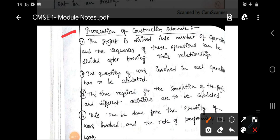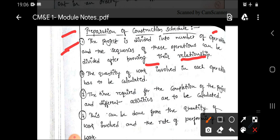Next comes the preparation of a construction schedule — what are the steps involved in the preparation of a construction schedule in order to get the duration of a particular project. The first step is: the project is divided into a number of operations or activities, and the sequence of these operations is determined after knowing their relationship. If you want to calculate the schedule of a particular project, you should divide the entire project into a number of activities or operations, and then arrange them in sequence after knowing their relationship.